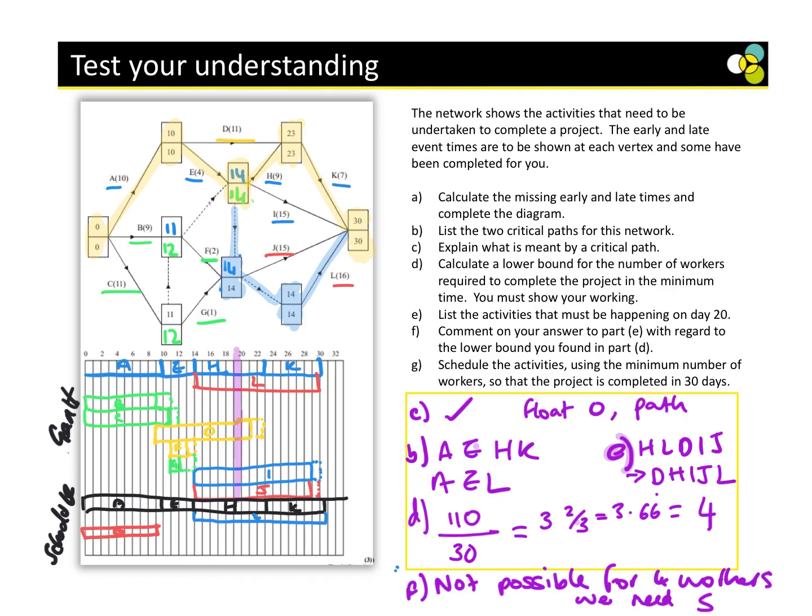Now, next is C. Even if we moved C, like slid it across, it's not going to fit. So C is going to have to be on its own row. Now D, let's say this is D, here, D we could slide across so it will fit in. Okay, we could slide across or we could bring it down. It fits nicely actually next to B. Okay, so that is now D.